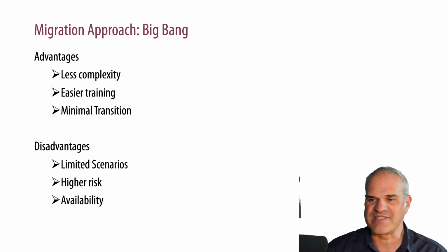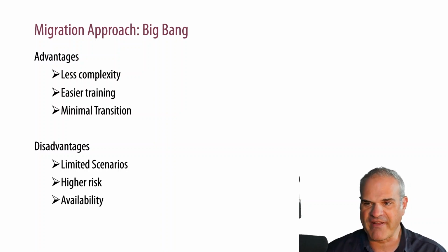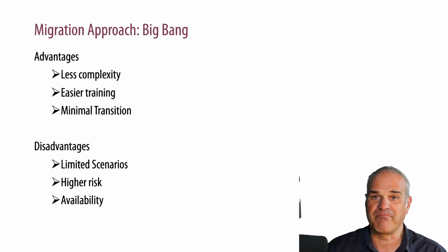But disadvantages, it's very stressful for everybody who's involved. And you can only do it in limited scenarios, higher risk. You need the whole team available, but it's very easy from the change management point of view because you only have to communicate this weekend: we're going to migrate you from one tenant to the other tenant, not more and not less.